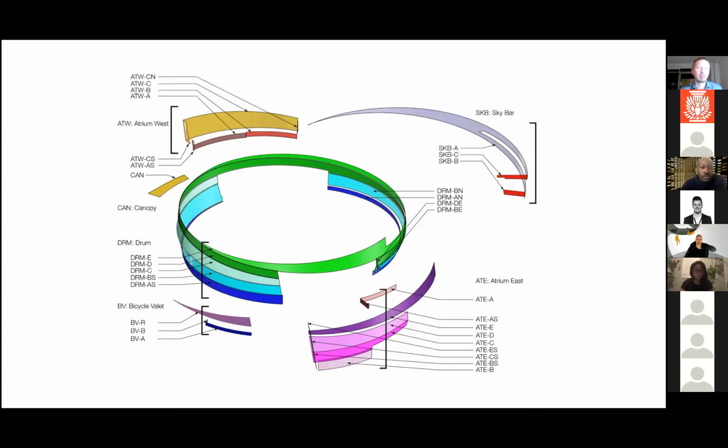But in this case, it went back and forth again, and eventually became a paper-based delivery, which is why all of this needs to happen, so that this can basically be delivered in a traditional design bid build sense where, somewhat simplified, we hand up a stack of paper, and someone has to interpret that stack of paper without any contact with us, right?